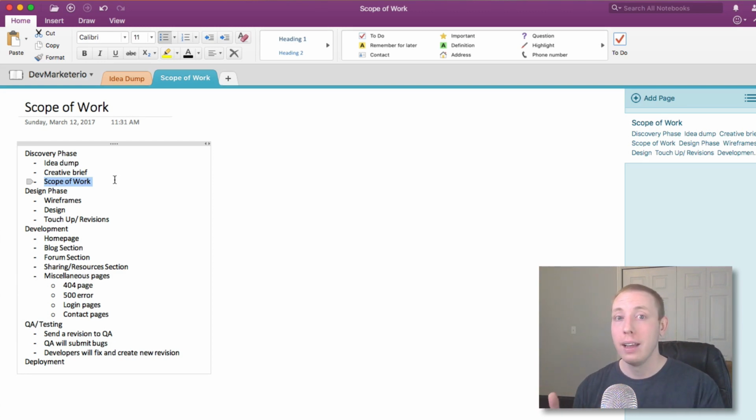Okay, that's when we have to go back and do an addendum or whatever you want to call it, where we make a modification to the scope of work, and that will affect timelines that trickle down through everything else. So that's a really important thing to do, and it helps protect you, because down the road, when a client inevitably comes up with some other idea that they dreamt of last night and they want to pretend like they had that idea all along, you can say, hey, it's not in the scope of work, I'd love to do it, can we try to fit it into phase 2 or something like that? And usually you can have that conversation pretty easily if you've got the scope of work to come back on. If you don't, then the client will always try to push you into doing something. But you need that scope of work to protect yourself.